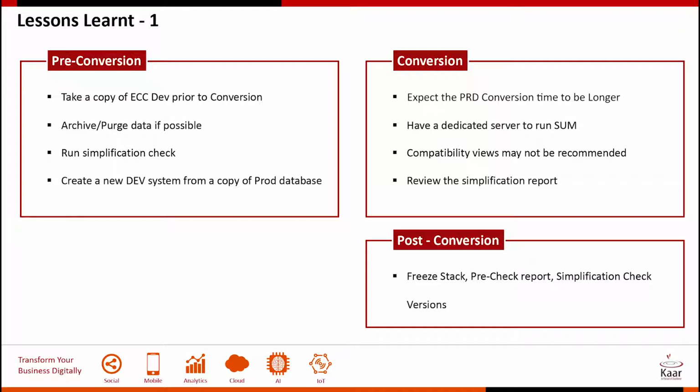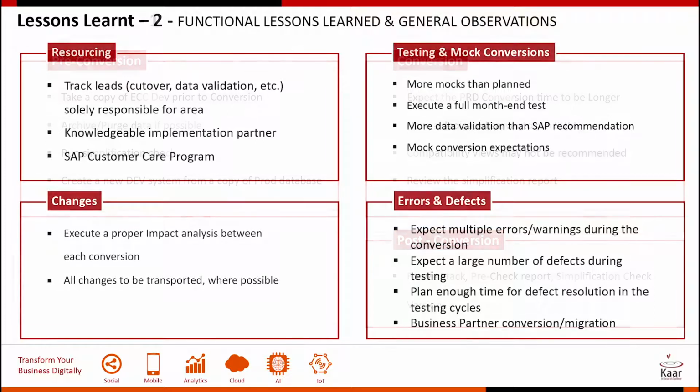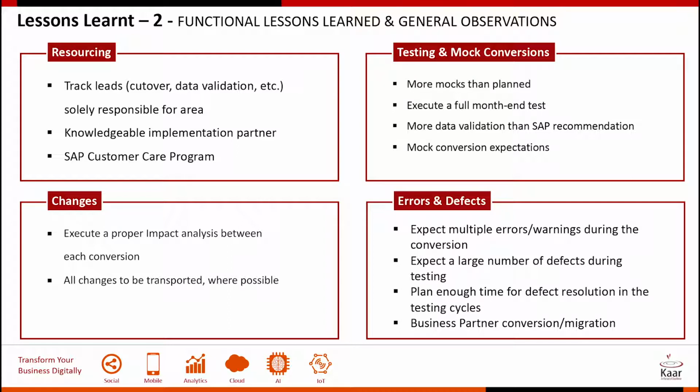Again, post-conversion, the things you need to understand are that the stack should be frozen and you should have your pre-check report and so on. On the staffing, have separate leads for cutover, data validation, and your reporting, so that each person is responsible for his or her area.